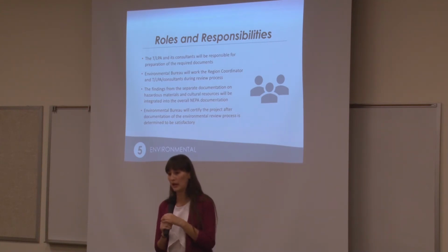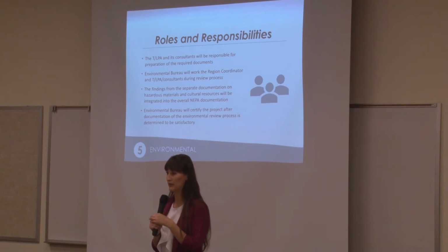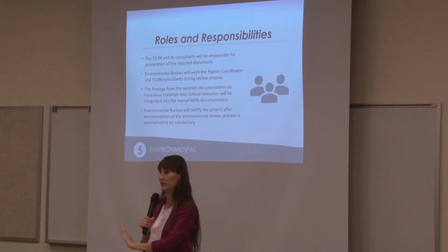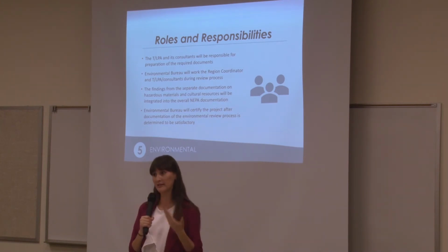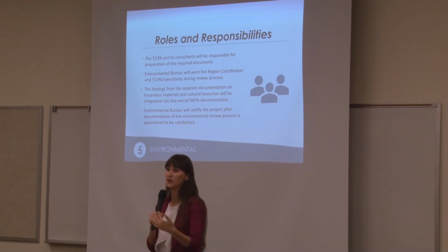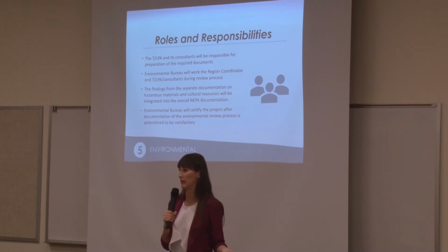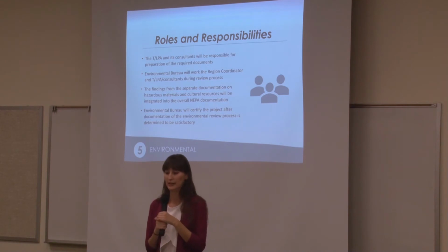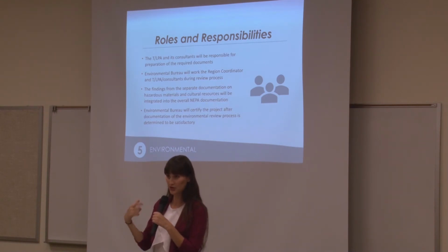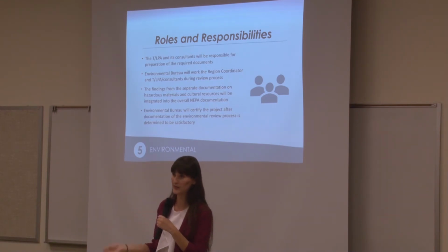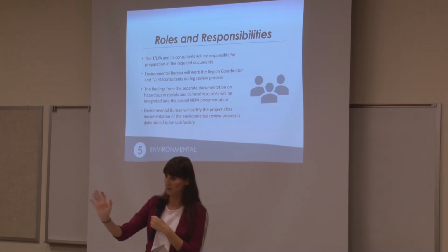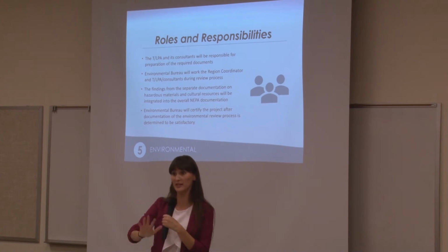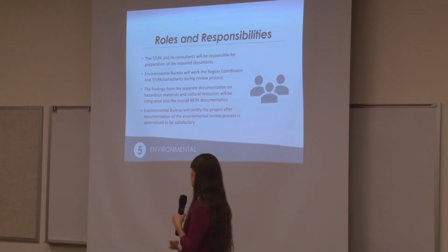If you are in an area where there is a high number of Spanish-speaking or other than English-speaking populations, then you might need to have additional public outreach meetings to make sure that everybody is informed about the project and has an opportunity to comment on it. Brian might let you know that some of those things are necessary. So all of that documentation is required by you all, okay? It's your responsibility to make sure that all of that happens.